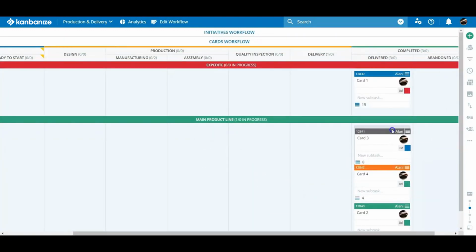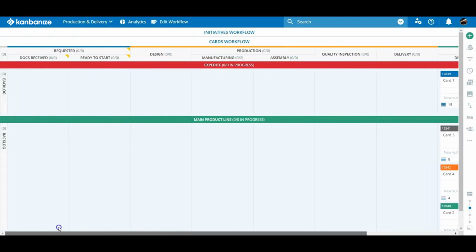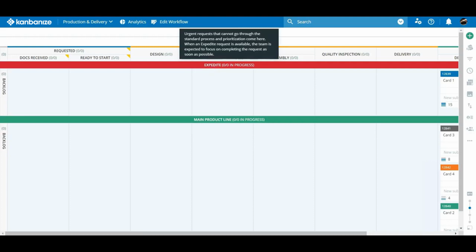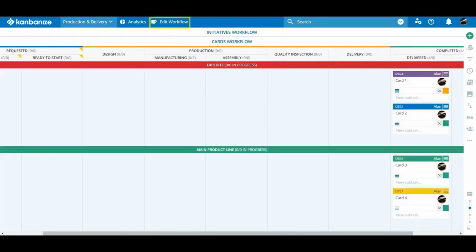The general idea is pretty solid. Requested work is blue, stuff you're working on is orange, and done is green. Sections can be divided and divided again using sub-columns to represent separate stages within different working areas. Different types of work can be broken down with horizontal swim lanes, but you can also merge board areas together.